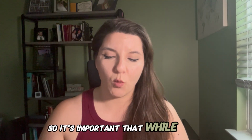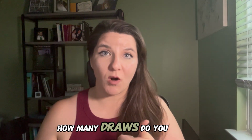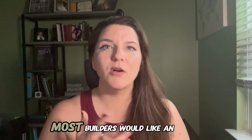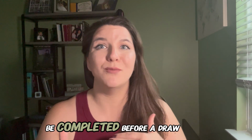So it's important that while you're researching builders, you understand what they like to work with as far as lending. Ask them, how many draws do you expect to get during this process? And at what point in the process do you want the first draw? Most builders would like an initial draw immediately after closing to get started. However, some lenders require work to be completed before a draw is given.